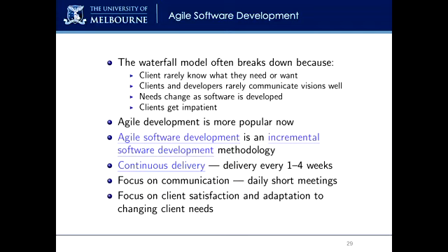A scrum is where we all huddle together in a stand-up meeting. We stand up because nobody likes to stand up, so the meetings are very short, where you discuss the day's development and what can be done the next day and the next day and the next day, and so on. You do that every day until the actual sprint is complete. And at the end of the sprint, you supply a basic prototype up to the sprint point to your clients, which makes them happy. They provide feedback, which then allows you to continue the next sprint until eventually you get to the end of the project.